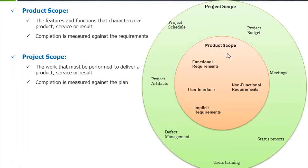Here, there is a project scope and a product scope which need to be addressed by a project manager. The product scope covers the features or functionality that characterize the product, service, or result — completion is measured against the requirements. On the product scope side, we have functional requirements, non-functional requirements like speed and ease of use, user interface, and implicit requirements.